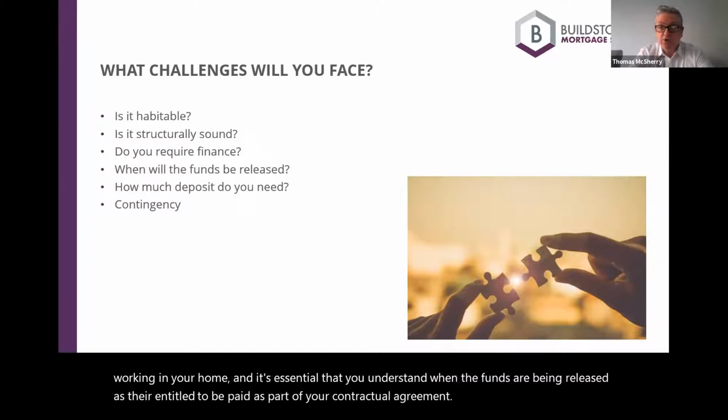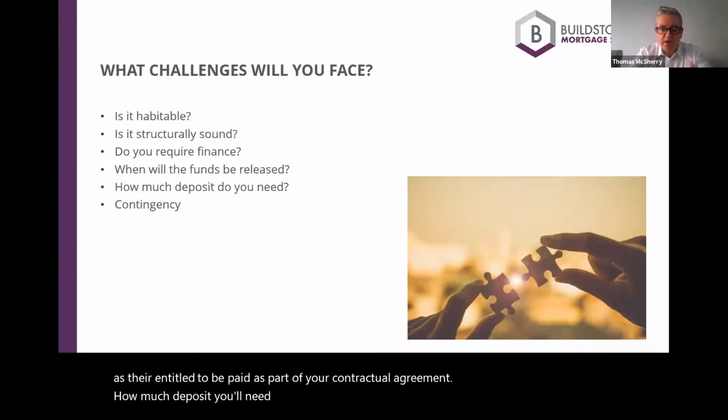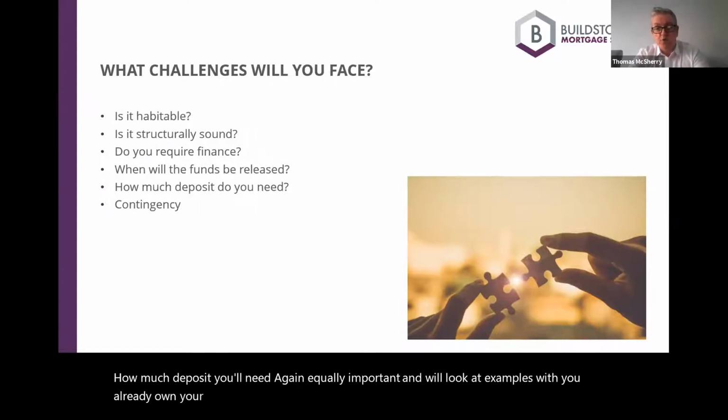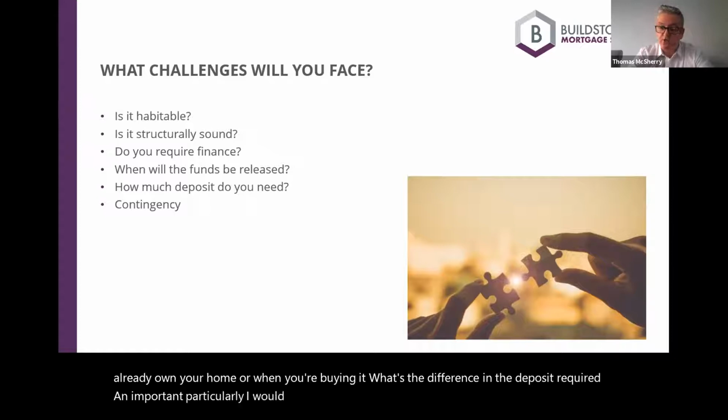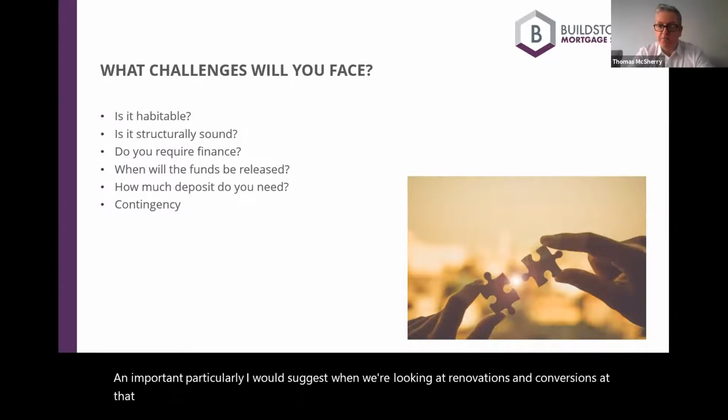How much deposit you'll need, again, equally important, and we'll look at examples where you already own your home or when you're buying it. What's the difference in the deposit required? And important, particularly I would suggest when we're looking at renovations and conversions at that heavier end, I think we need a bigger contingency than even that typical 10% that people talk about when you're building a new home.